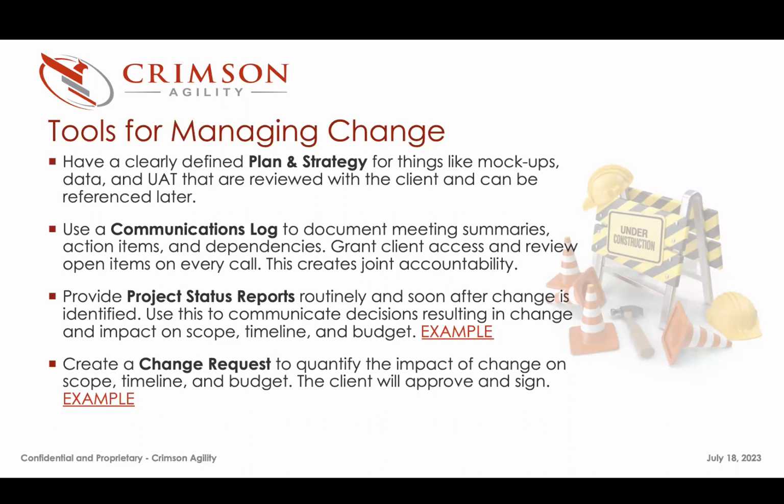We told you up front that we had 15 hours allocated to that, and they have needed much more of our help than we ever could have anticipated. So it makes it easy to break that down and say, hey, as long as they continue needing our help, we're going to continue racking up the hours there to support them, because ultimately we're in a guidance, support, validation capacity. That's our role. They're doing most of the development. So excellent points.